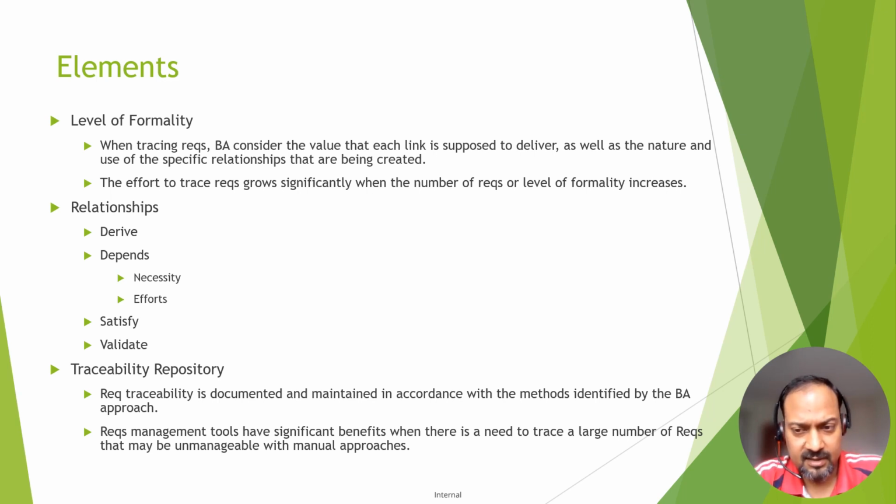So derive is something like the business requirement comes, and we have created a solution requirement for that. For example, the business says that in order to access the application, there needs to be authentication or authorization, or only an authorized person needs to access the application. In order to create this functionality, what we have done is we have created a login page where username and password are entered. So this requirement is derived from the business requirement.